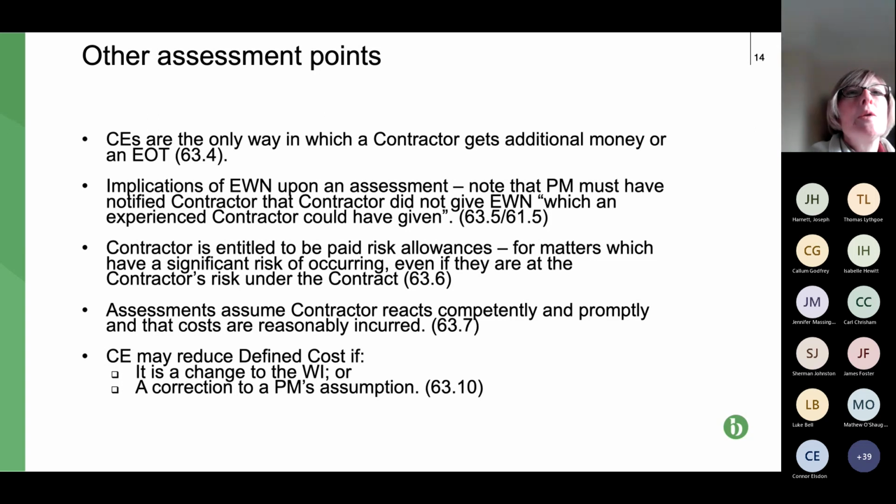So it's not technically the way to regard it, but I always regard a quote as being like a mini lump sum contract. So it includes the cost of your time, but it also includes risk allowances for doing the work, taking account of the fact that you're forecasting a lot of your cost.